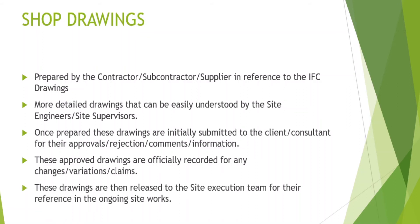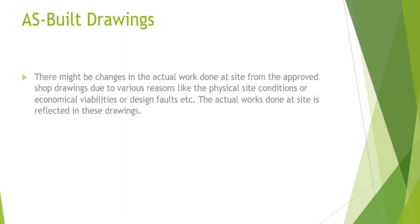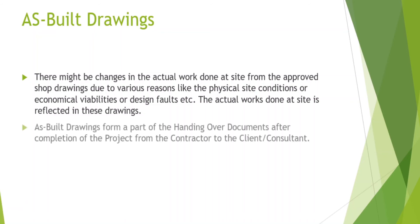The execution team will have these approved drawings with them so that the same can be reflected at site. Finally, we have the As-Built drawings, which form part of the handing over stage. In the actual works done at site, there might be slight changes due to various reasons. These actual works are reflected in the As-Built drawings. These drawings form part of the handover document which is given from the contractor to the client or the consultant.